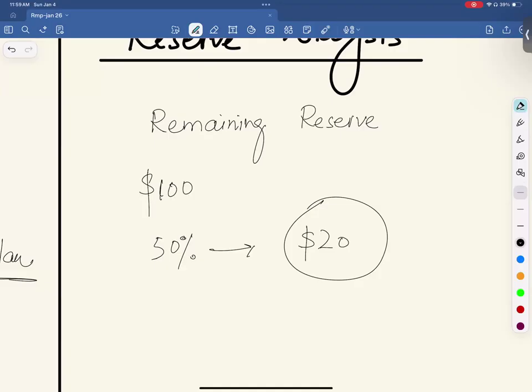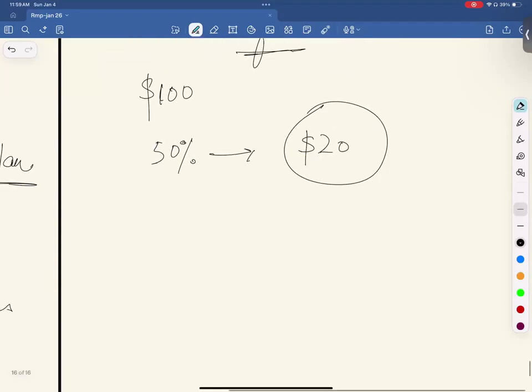Fantastic, thank you, Rifat. You may expect a question in the exam similar to this, exactly similar, though obviously the numbers or statement would be different, but the context I'm explaining: this was the number for reserve, this is the project completion. Now you check the reserves are less, so you analyze the remaining risk, and based on that, come up with the decision if you need to request extra budget or not. So you conduct remaining reserve analysis, and this is continuous activity reporting. This is an iterative activity, right?